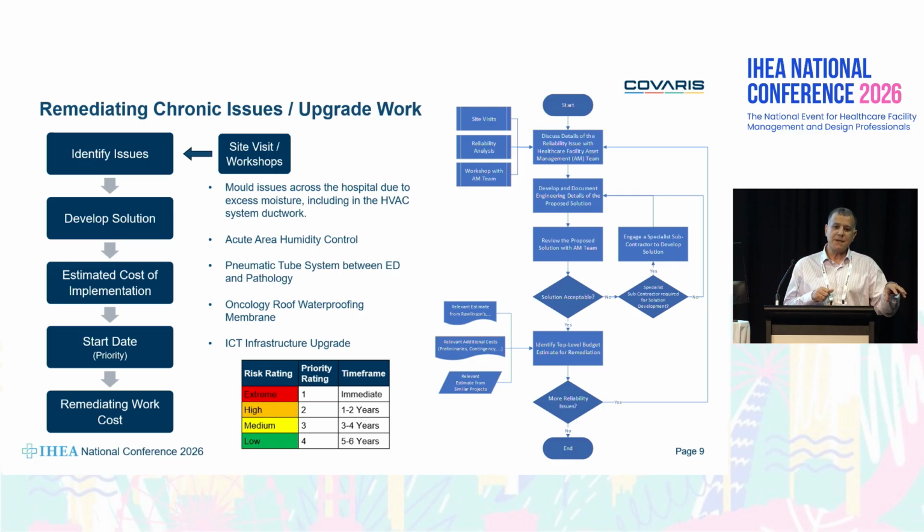The building is compliant because it was built 15 years ago, and that was to the standard back then. But if you do a major refurbishment, or if you're putting all these new high-tech facilities in the hospital in 5 years' time, then the current standard, I think, is Cat 6 or 6A. So we have to put a budget aside to upgrade all these cables to Cat 6A. So that's another cost that you only realize when you sit and talk with the asset managers and the contractors that are servicing the facilities.